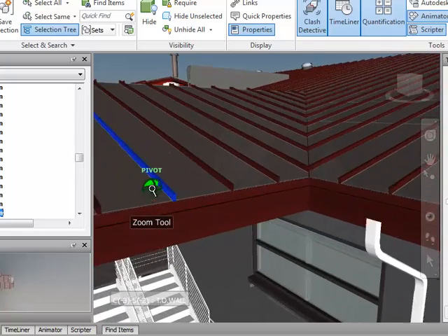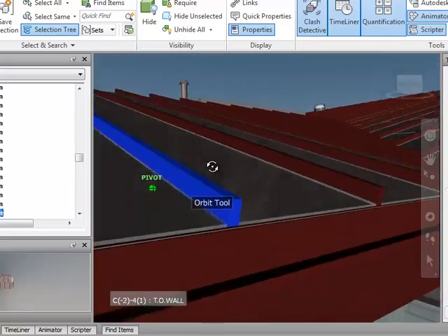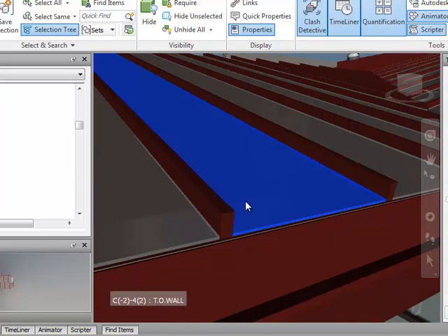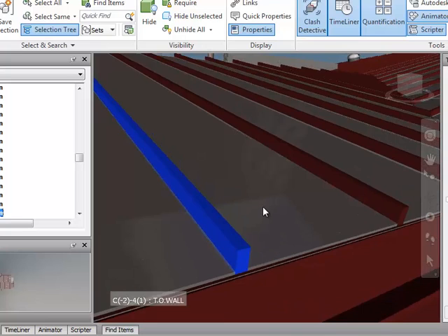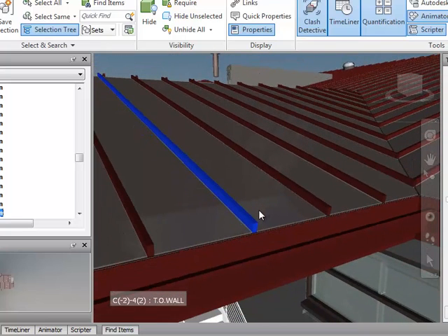The roofing is metal, but the other one is absolute roofing. Yeah, these are both going to be metal. They just have this so rain and snow flow off in a straight line. So it's still roofing? Correct, this would all be part of the roof assembly. Still metal, this is Division 7, not 5.